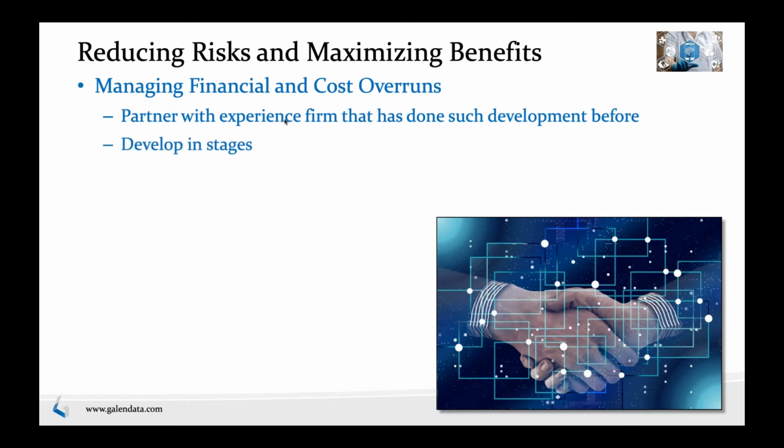Development stages could be another way to control your cost. When you go into product development, sometimes you want to build the best thing out there. A lot of the time that's not the right approach. So try to build in small stages: do one or two things the system does, go out to the market, get feedback, and then iterate upon that. I've been burned in my prior life by trying to do too much and never getting to market, and having a competitor consistently take over. This is a lesson learned in a very harsh way for me: make sure you develop in stages, figure out the MVP that you need, go to market with that, and then come back and iterate.